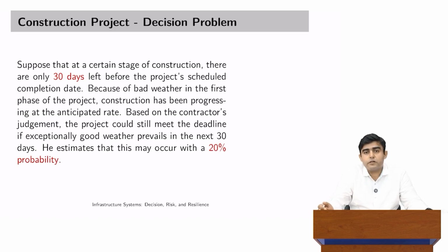All these contractual obligations also have some financial commitment involved. For example, if the contractor does not meet the deadlines already committed, there may be certain penalties imposed by the client, because contracts are legal documents. So what the contractor has to do is meet the deadlines once they have entered into this agreement. They may have to expedite the project.